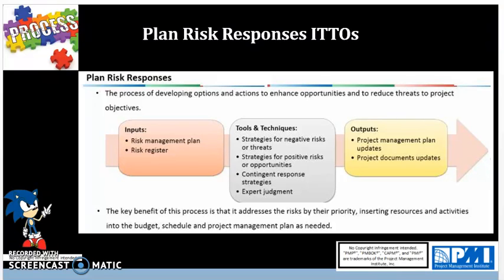Then you have mitigate, taking early action to reduce the probability and/or impact of a risk occurring on the project. An example of mitigation is designing redundancy into a system, which may reduce the impact from a failure of an original component. So this could be like having a backup of your data center and backing up all your data in various versions or different servers. In a version of cloud computing, you have different centers that you will be operating from, or basically availability zones. So cloud has different availability zones, so in case one area crashes, you have a backup somewhere else on the globe.